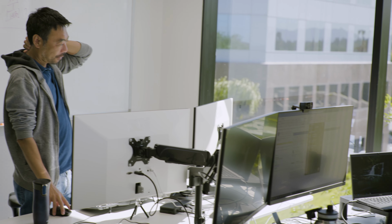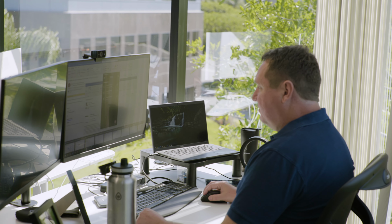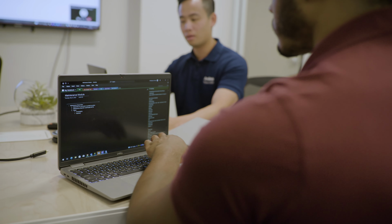Going Agile really requires both companies to trust in the vision early, but allows for the development to start much sooner than traditional projects, which in our case was 2 weeks after the workshop ended. This extra space in the project allowed us much more control and the ability to adjust to changing requirements and needs. As things were running really smoothly, we decided early on to run it in a Kanban style approach to reduce the number of meetings and really the total overhead needed.